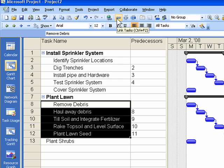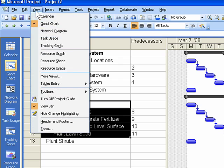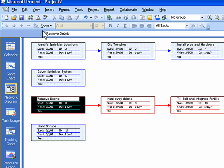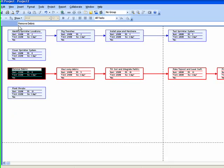The logical place to view task relationships is the Network Diagram view. Create task relationships in this view by clicking and dragging between tasks.